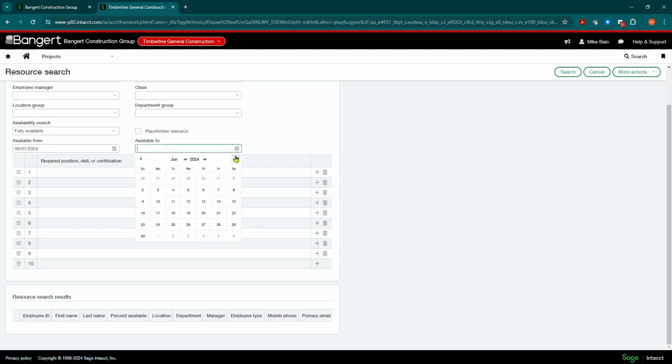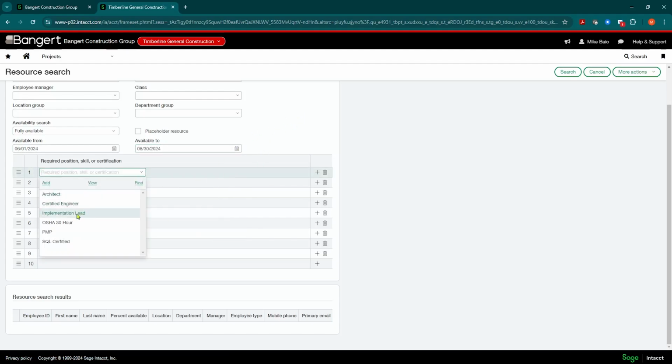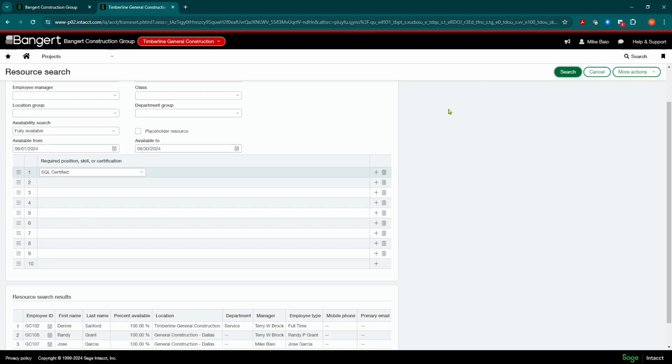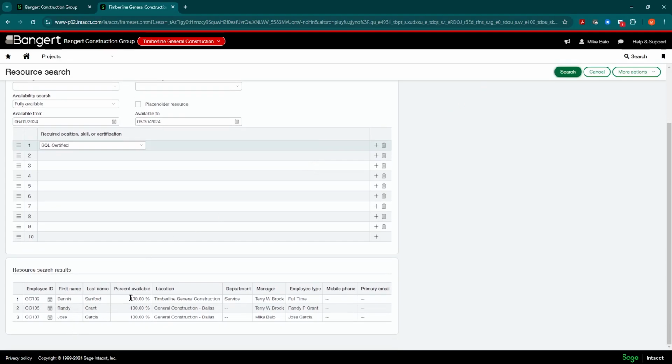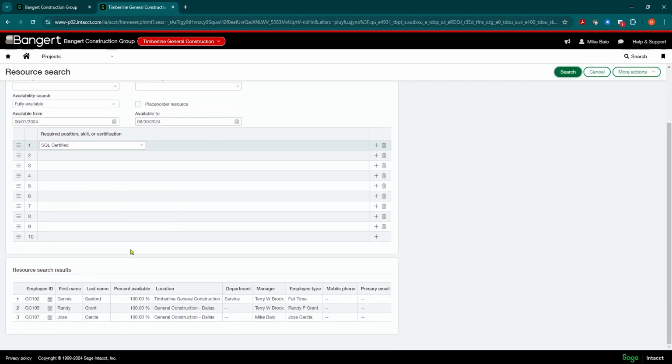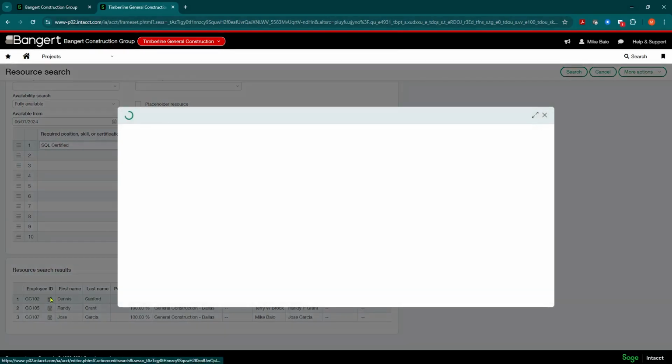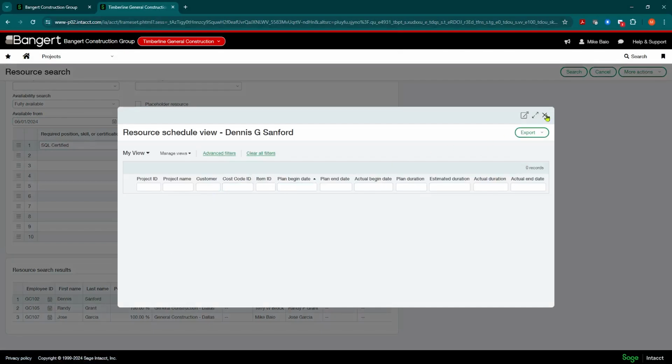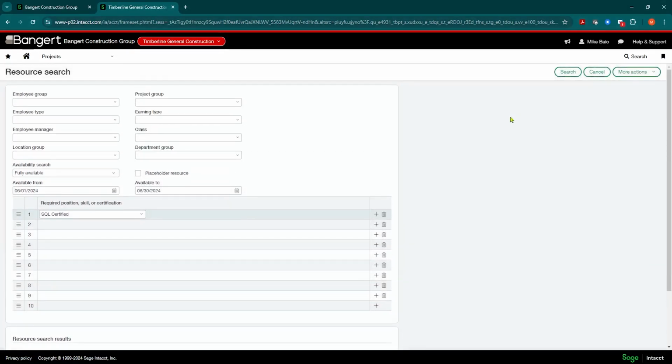And I could say June to June 30th, and then only show me individuals that have the SQL certified skill. I can hit search, and there's 3 individuals, and they're 100% available. So now I can start getting them scheduled and booked in the system. Okay, so you can do that as well.